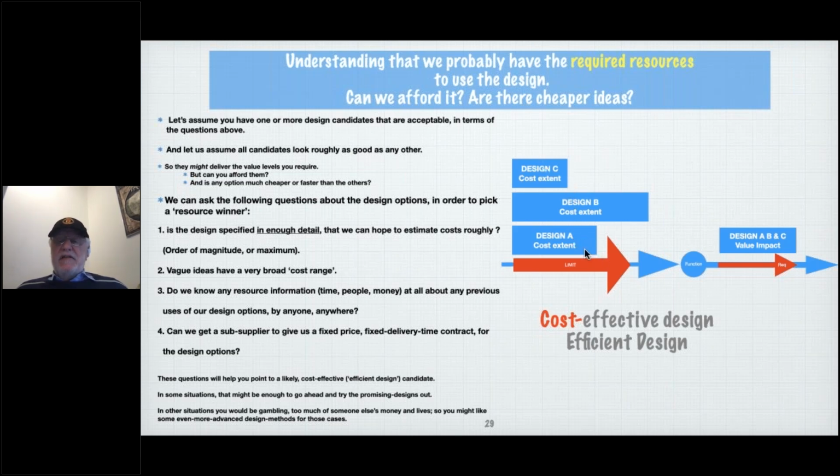a bit? Now, the other thing is we can't just choose up to the limit of our budget, because we might have 10 other values that we have to simultaneously satisfy in this project, and they are going to need some budget. So generally speaking, if we have 10 values, each value can use about 1/10 of the budget in very general terms, and anything far exceeding that is sort of stealing budget from the other values that need to have their own designs. So here again, here's a set of questions to ask about these costs, which will help you decide what you want to do about this. Graphically, these represent the degree of cost, lowest degree of cost, middle degree of cost, compared to some given budget limitation.